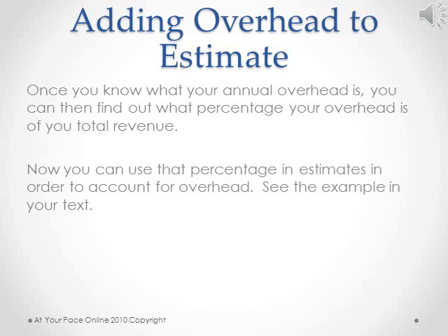Adding overhead to the estimate. Once you know what your annual overhead is, you can then find out what percentage your overhead is of your total revenue. Now you can use that percentage in estimates in order to account for overhead. See the examples in your text.